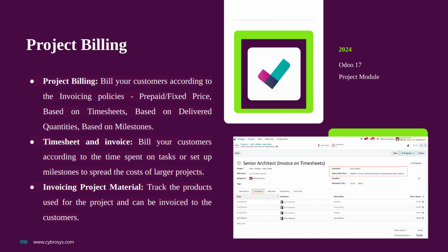Then project billing. You can bill your projects at a fixed price, or based on the timesheet, that is, the hours employees have spent on the project, or based on the delivered quantity, or based on milestones. And you can also bill your customers according to the timesheet spent on a task, and set up milestones to spread the cost of a larger project.